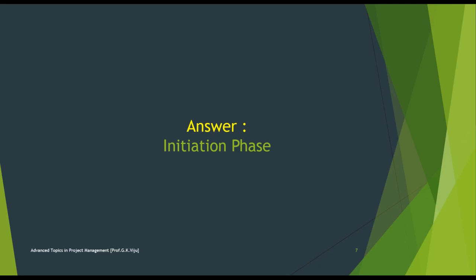You will review the project charter to see if the high-level assumptions and constraints made during project initiation are still valid and whether or not the market conditions are still favorable for the project. Performing this process may result in an update of the charter or an addition to the project charter. That means updating the project charter. In an extreme scenario, the project may result in project termination.